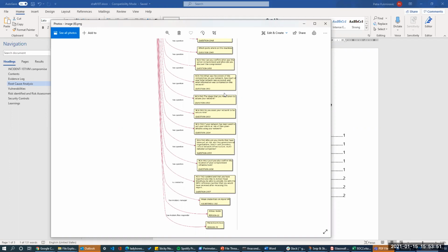And based on an anchor and based on criteria, we can then generate any kind of data frame in a Jupyter notebook. And what we're also doing on the side, which is really cool, we have a lot of notebooks which automatically generate that kind of visualization or that graph or that data frame, and then push it to a Google Sheet, which is a lot more consumable than expecting all of our stakeholders to consume data from a Jupyter notebook if they're less of a technical audience.